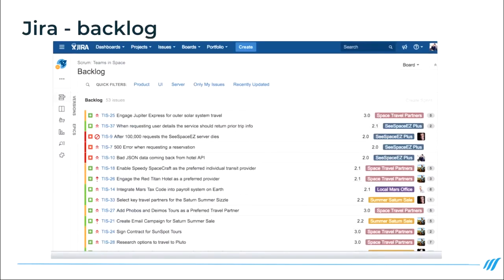Once you've created that, we can then push some of the features into Jira as requirements, which takes us to the next page. Within Jira, we have a backlog of work, shown on this page here. The backlog is an ordered list of all of the jobs that need to be done in order to achieve your product. It's ordered so the highest priority item is at the top of the list, and that should be the one where developers start taking the work from next.